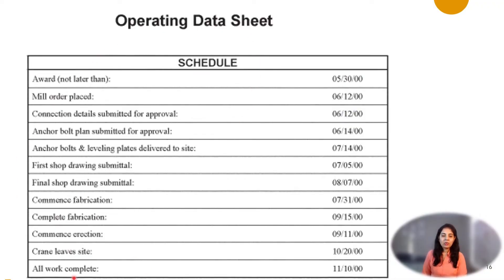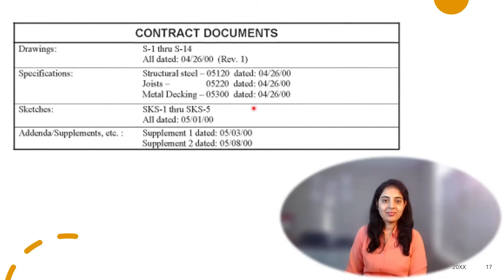The schedule of work shows which work will be done on which date — for example, material order will be placed on 06/12 and fabrication will be completed on 09/15. The contract documents section includes drawings such as S1 through S14 with dates and revisions, along with specifications, sketches, and supplements.